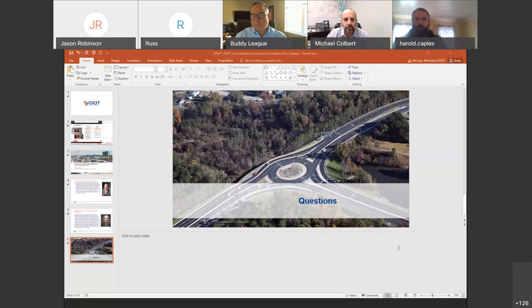Okay. I saw a question come in about asking contractors at the beginning. Obviously there's a level of expectation that the contractor, and I think that goes without saying, that we're anticipating and expecting you folks in industry, Mike, Buddy, to be doing what you're obligated to do. Y'all should be able to see this went to everyone. We've got no leg to stand on if we're not meeting our contractual obligations for getting payment. Just to be clear, that was one of the things we covered yesterday: retainage is allowed by our specs when you fall behind schedule, quite frankly. When you're not performing, retainage is allowed in accordance with our standards and specifications. That being said, once you recover, payments do resume. So that's one of those things that should be clear.